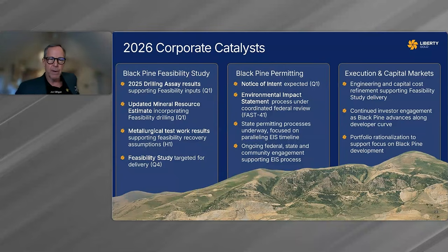And we will see metallurgical results and other engineering results come out over the next period, leading to the feasibility study release in October. The permitting process, as I mentioned, the key critical path here is the schedule review and re-release of the schedule at the end of March. And that really sets the new time frame for permitting and ultimately construction and first metal.